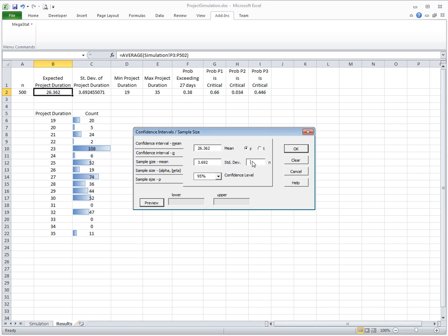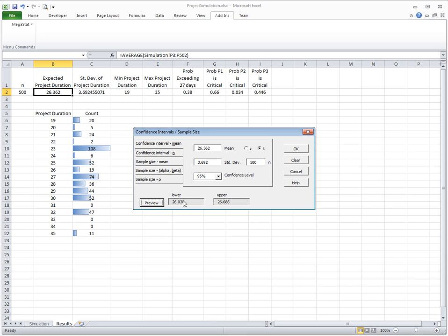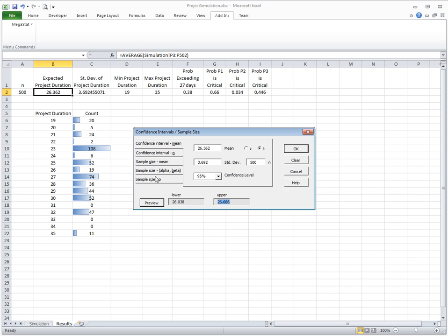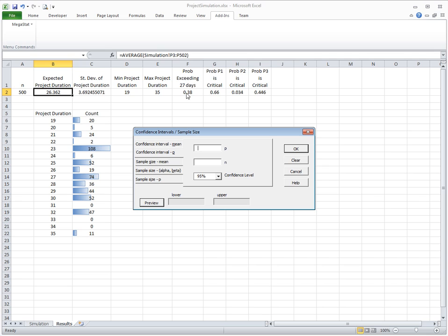We can see that the true mean value, true expected project completion time, is somewhere between 26 and 26.7, with 95% probability. Or we can do a similar thing. The likelihood of exceeding 27 days according to my experiments is 38%. But what is the true probability with some confidence?